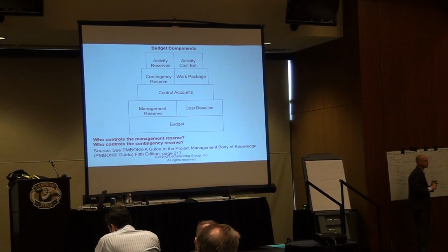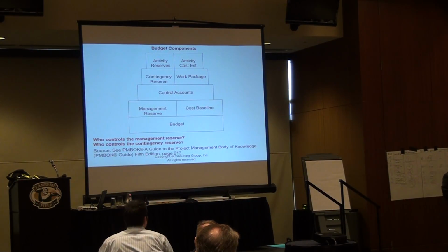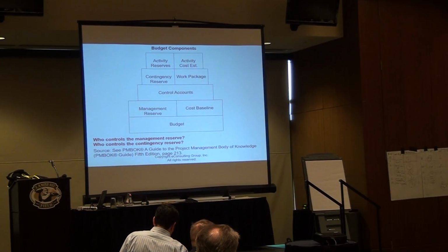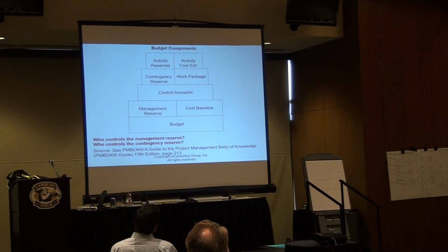Where do you put this 22,000? That's a reserve. You own that reserve, and it's called contingency reserve. Who owns the management reserve? Sponsor. Very good. Okay,